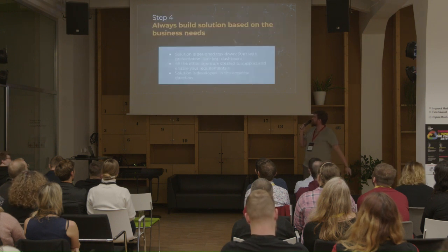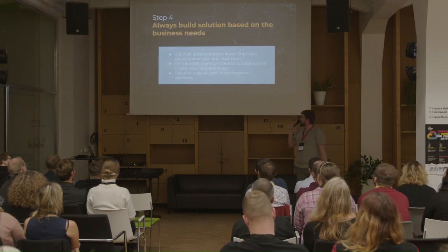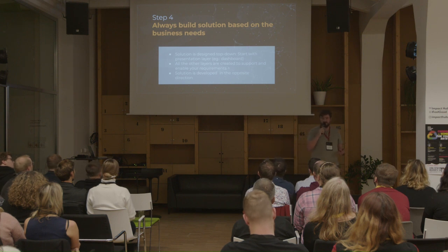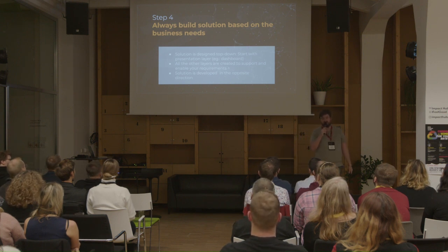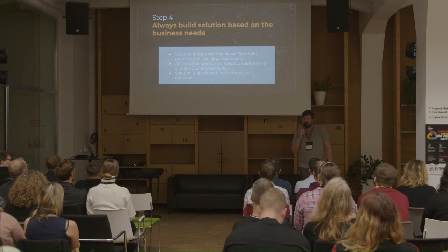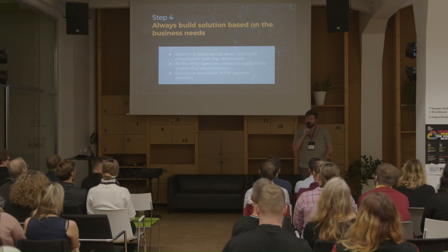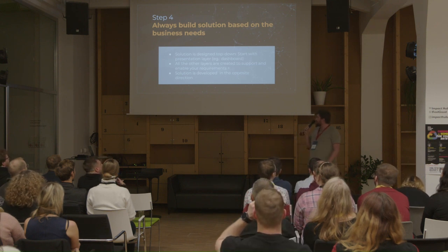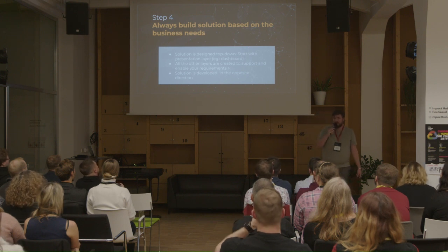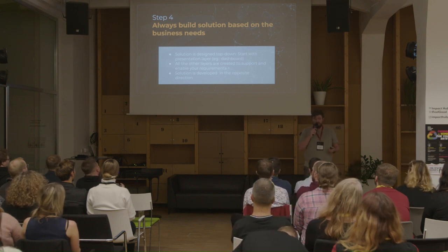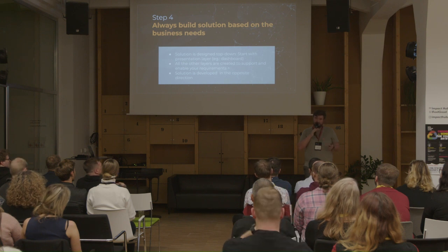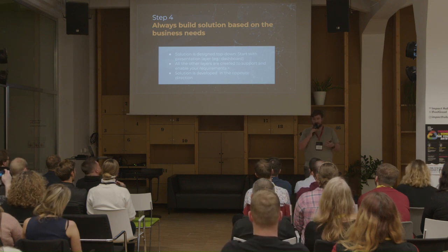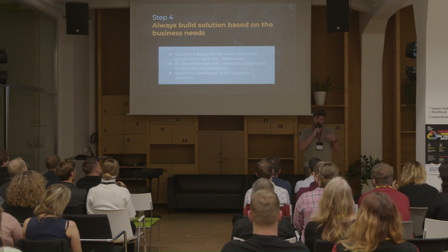Okay, so in step 4, this for me is the most crucial part: we need to only build things which have value and are something that the business really needs. And as I chose a dashboard to be my representation, what I like to do is start designing the solution from the visualization layer, from the dashboard, from the business. And that will dictate how to build my integration layer, my transformation layer, and all these nice things that a data warehouse consists of.